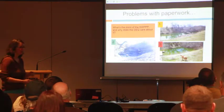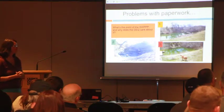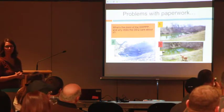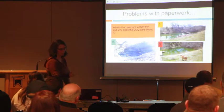And you are going to be required, if you cause problems, to fix what you break. And somebody asked in the last section, how far down are we required to clean up? If you create a problem that goes into the North Platte, you are required to clean up anything as far as it goes off your site. If we can pin it to your site, you will be required to clean it up all the way down to the water body itself. So it doesn't matter how far away it is. If it's coming from your construction site, we will definitely make you clean up everything that comes off that construction site. There's no limit to how far away that goes from your construction site. So just keep that in mind.